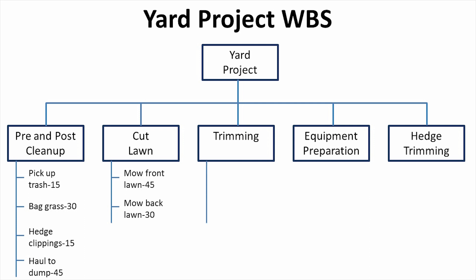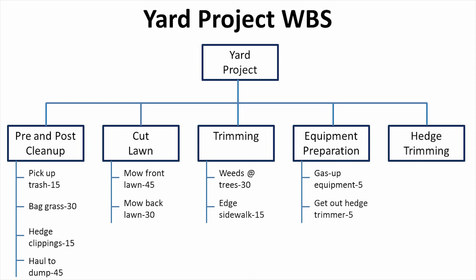Breaking down the trimming: I've got to trim the weeds around all the trees — that'll take about 30 minutes — and then I need to edge around the sidewalk, which I've allocated 15 minutes for. To get my equipment ready, I need to gas it up — five minutes — and then find and get out the hedge trimmer, another five minutes. Under hedge trimming, there's really nothing to break down other than trim the hedges, so I just have a time of 30 minutes.